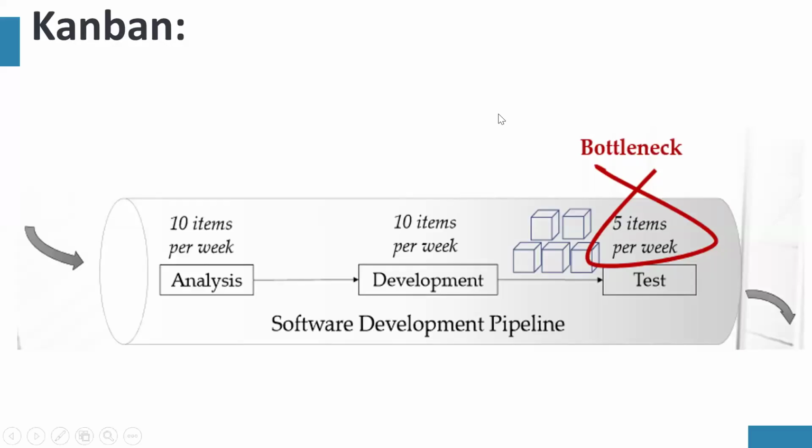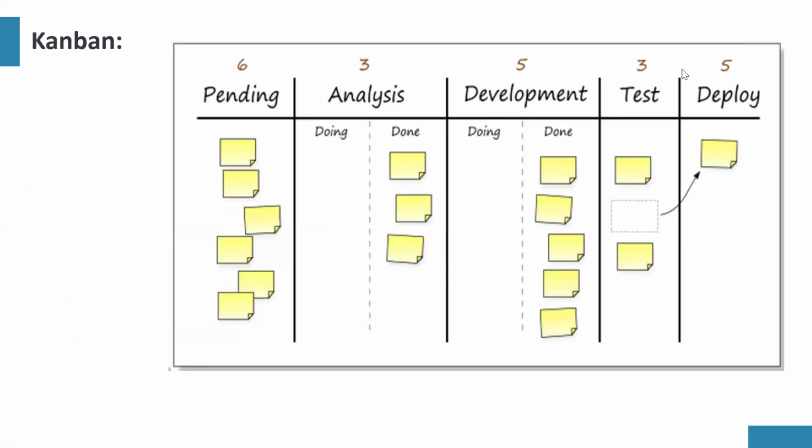So the concept of Kanban is to reduce the work in progress. That means minimize the work in progress based on the capacity of the team per time. And when you minimize it, you actually move faster, because if we keep pushing the work, a time will come that the bottleneck will be so much that the whole system shuts down. So I'm going to explain concepts like cycle time and work in progress, because there's something else we need to know about Kanban.